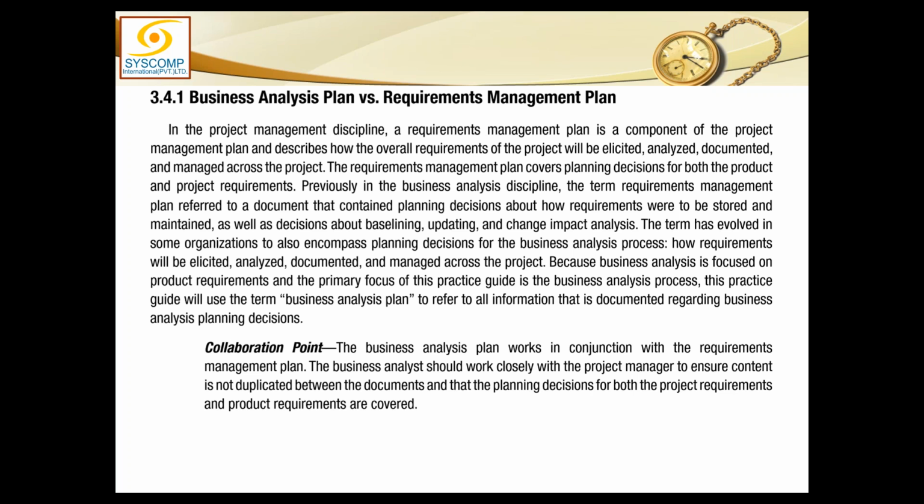In the business analysis discipline, the term requirement management plan referred to a document that contained planning decisions about how requirements were to be stored and maintained, as well as decisions about baselining, updating, and change impact analysis. From the perspective of business analysis, we have to set the overall picture of the requirement management plan, how we want the data to be stored. Now, the project will come later. When the project comes, how and where the data is to be stored, what are the criteria for establishing the baselines, when and how they will be updated, how change impact analysis can be carried out, and so on.